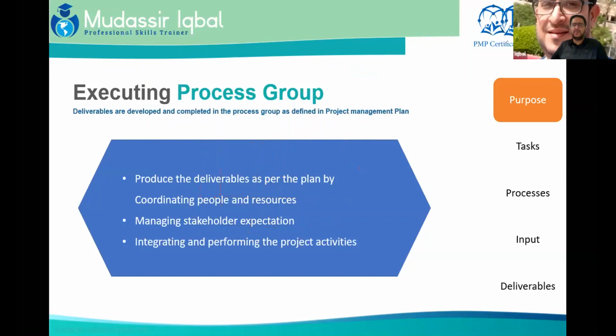Mudassir, you were just giving an example a few minutes back of the Middle Eastern countries' projects. Have you ever been to Dubai? Yes. The world's biggest mall and the world's tallest building are in the same premises. And I heard that within 3 years they completed that massive project. What sort of planning they would have done for that? It took them 7 years to deliver that project, because I think after the 63rd floor it starts running delays because of the air pressure that they could not plan for earlier. So it was delayed around 3 to 4 years.